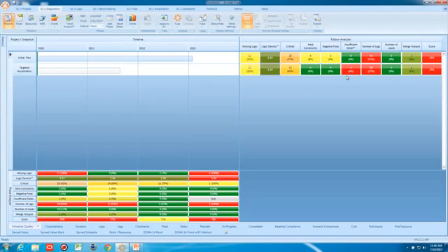Well, the two scores come out about the same. In fact, even a little bit lower. Our initial plan was just over 3 years long. Our targeted acceleration is just 1.5 years long. And the system now believes some of our tasks have insufficient detail because many of the activity durations have stayed the same while the overall project has gotten shorter. Those durations now represent more than 10% of the project duration. At that point, when there's durations higher than 10% of project execution, we tend to feel that there's not enough detail in the project schedule.